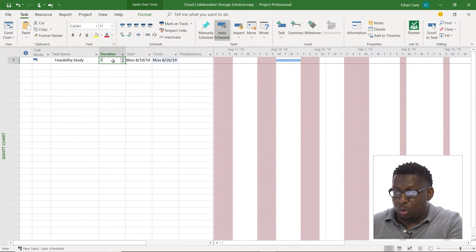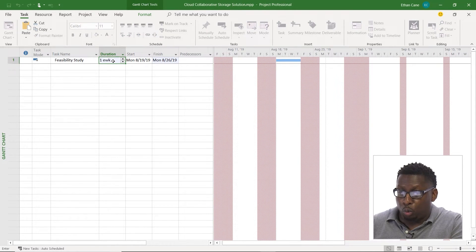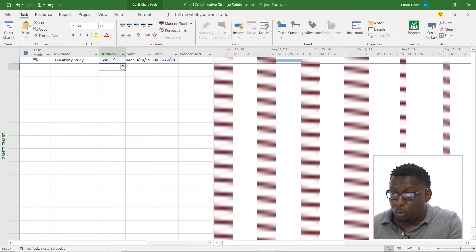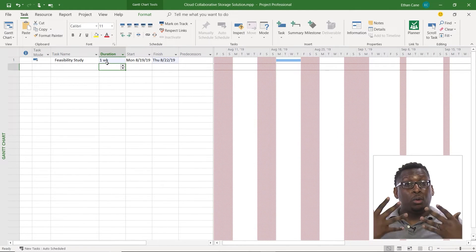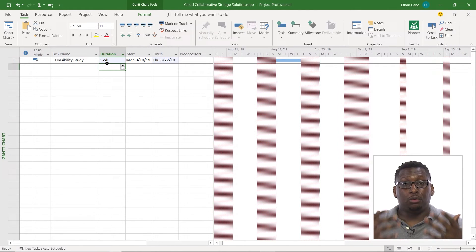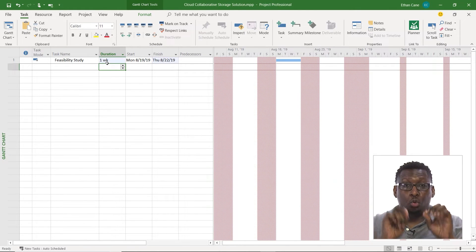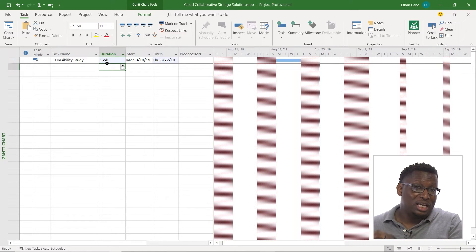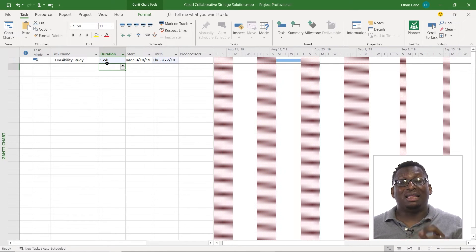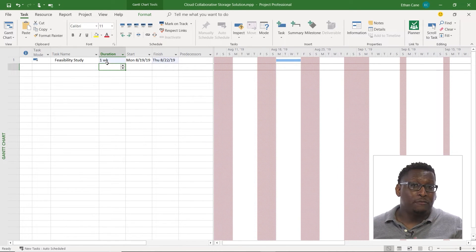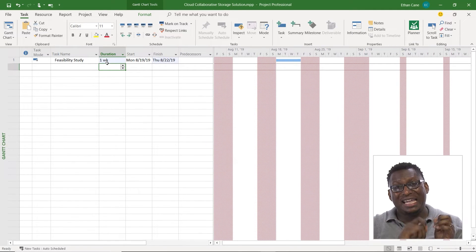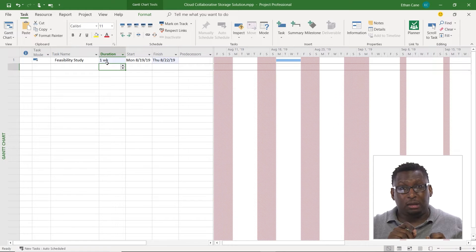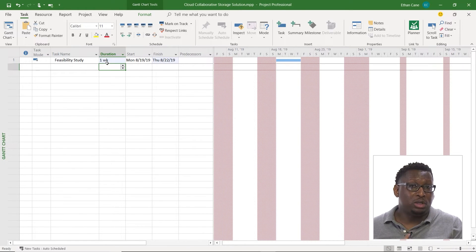So I'm actually going to leave this as a one work week situation, I want to do with work weeks. But I want you to see, duration is based on work weeks, days, months and not calendar. If you want to do calendar, you have to put that E in front of it, and then it'll change to calendar days, weeks, months, years.